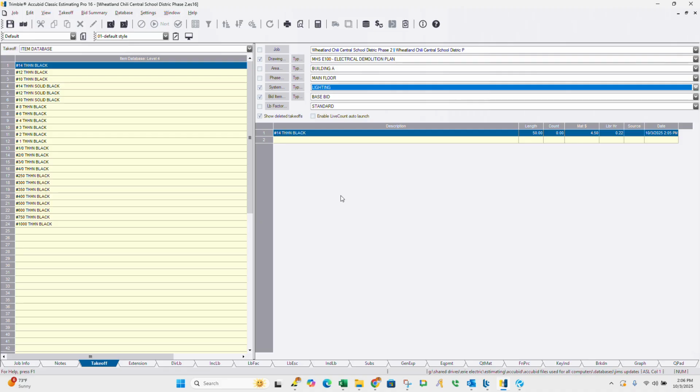So if we have a job and the project manager is reviewing it and it's like, oh God, we've already spent $200,000 on lighting. And then we look back at the initial estimate from the turnover meeting, and they've only got $150,000 for lighting. We know that job may be in trouble and we'll have to start making some adjustments. So that's essentially what these do.